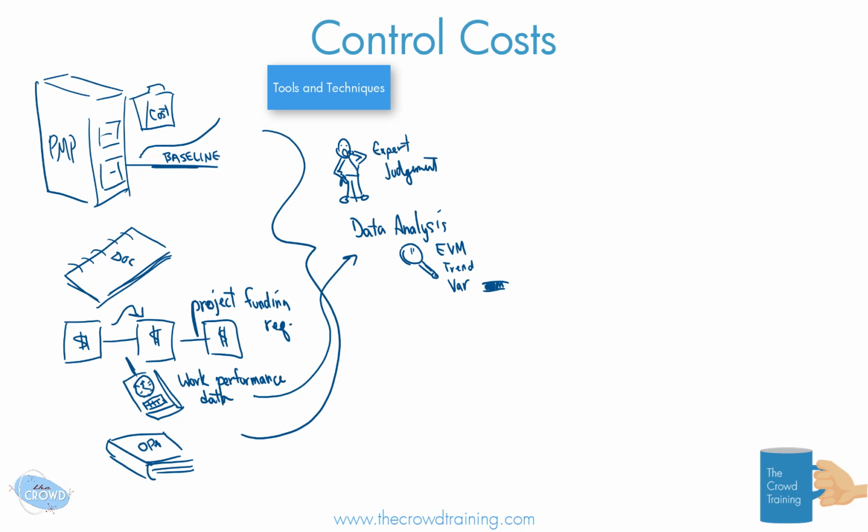From there, we also have one that is separated out now in the 6th edition of the PMBOK, which is the To Complete Performance Index. And that is an index, hence its name. But we're looking at, well, if we're at this point in the project and we want to be at this point at the end of the project and we're only at here, how do we get here? No matter what has happened historically up to this point, what is it going to take?